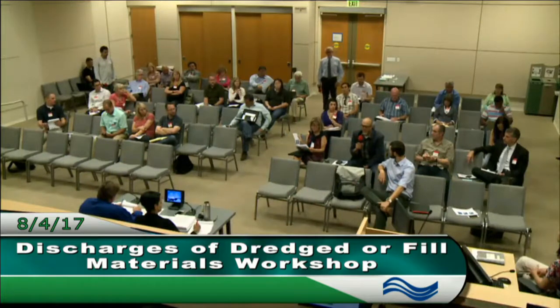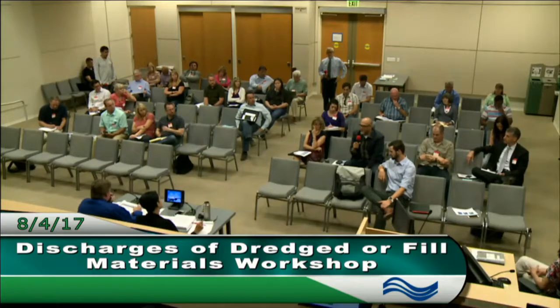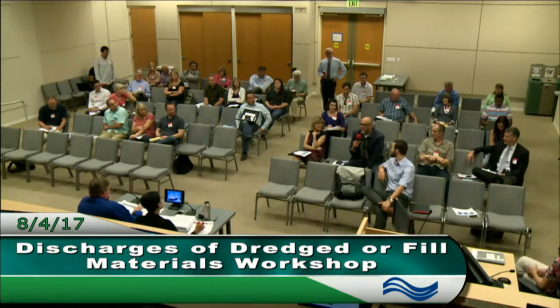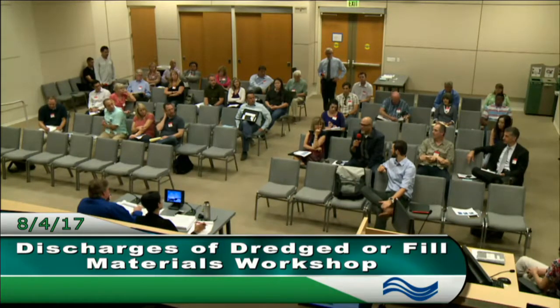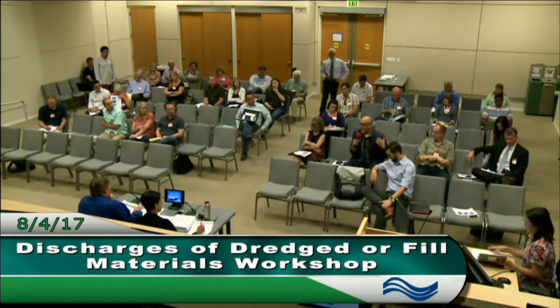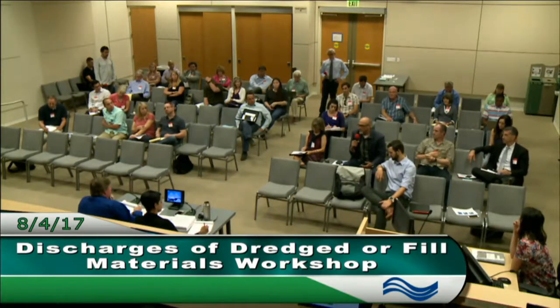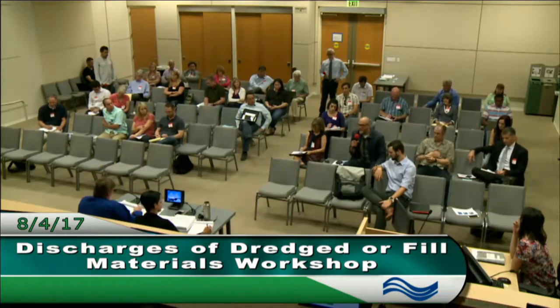Sam Garcia with Pacific Gas and Electric. And I think you might have answered my question, but right now, my experience is probably different from a lot in this room, that we don't necessarily experience significant delays with the current process. Thank you. Moving forward, I see that almost every single one of our applications is going to require an analysis of on-site alternatives, and that's going to add significant delay in our, first, our preparation time, and I guess this goes to my question, review time from the board to go through a B1 analysis or similar type process, even if it's just for on-site alternatives, is a significant document.